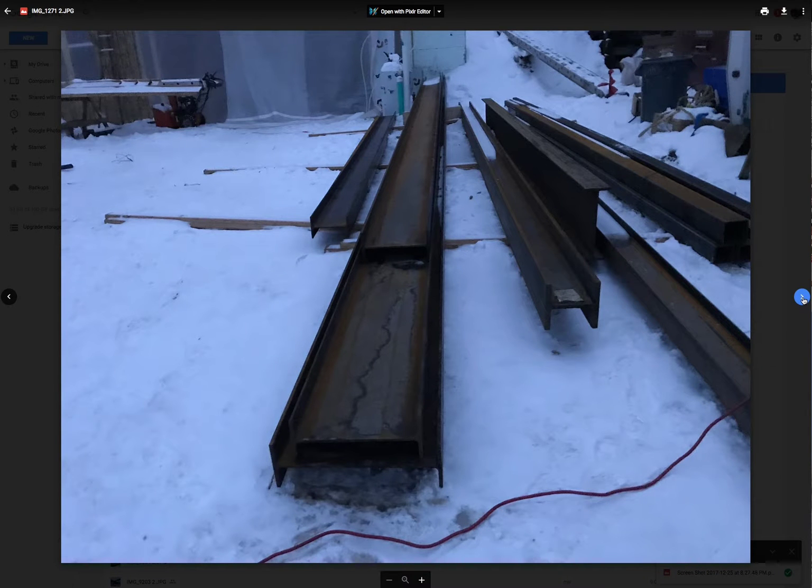All of our iron finally came in. We're fabricating on site. All of our posts, all of our beams, everything else through to finish. Our first $10,000 worth of iron, we just had so many issues with the bolts and the fabrication wasn't going together, really causing some duress. So all of our iron's on site, it's been great.